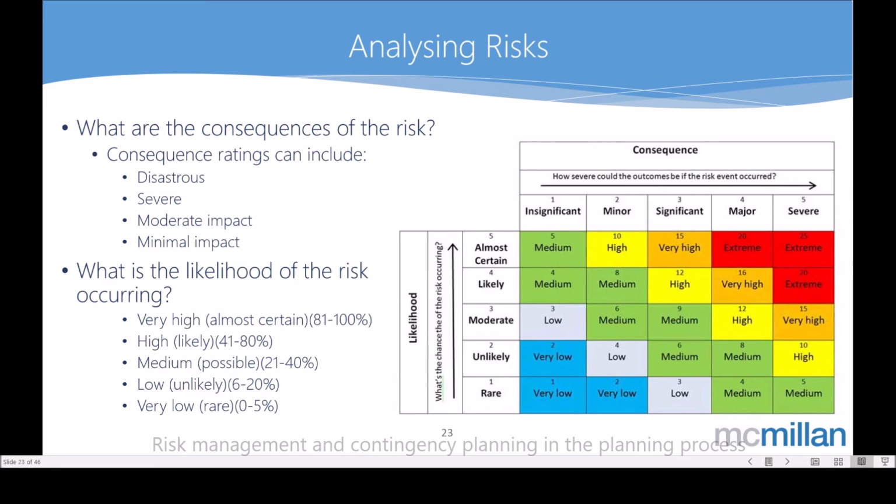We may even know of instability within the organization. Because they're a key player, if they don't supply the product, it stops all of our endeavors, it stops the whole plan from moving forward. We would consider that a severe consequence, and with almost certain likelihood, the risk assessment would be at the other end of the scale. It would be the red extreme, up at 25.